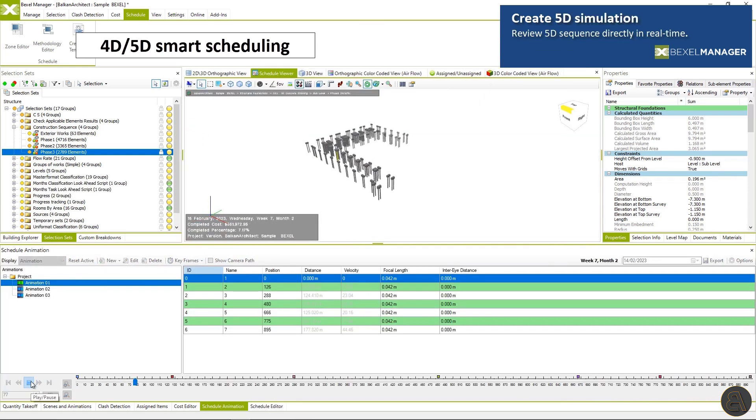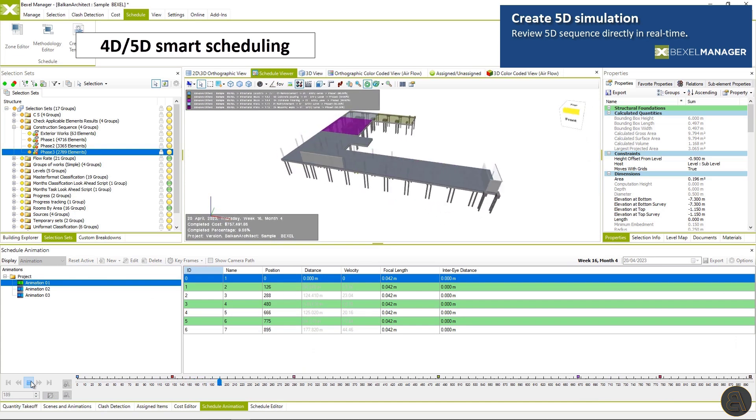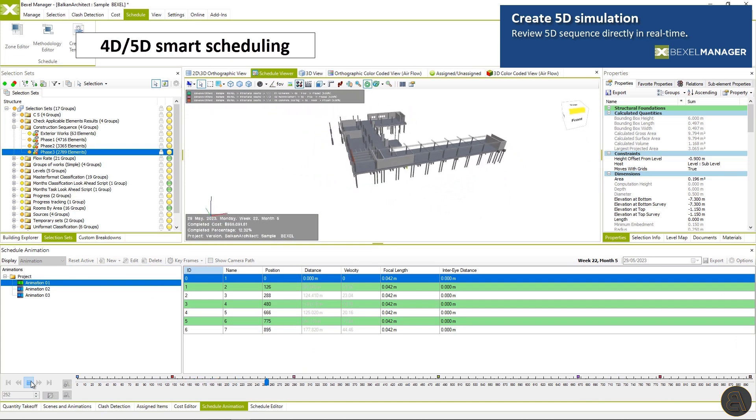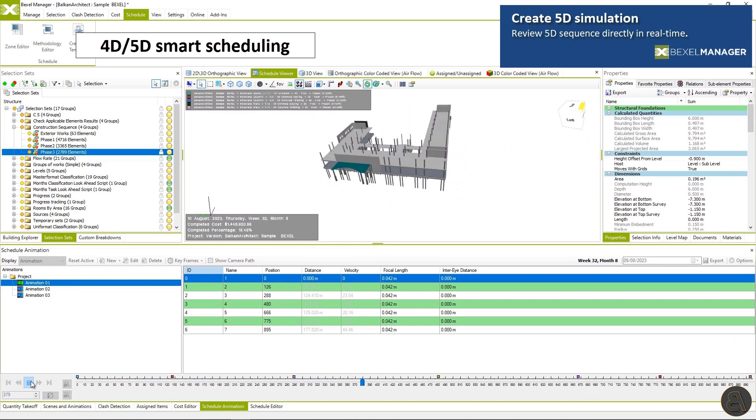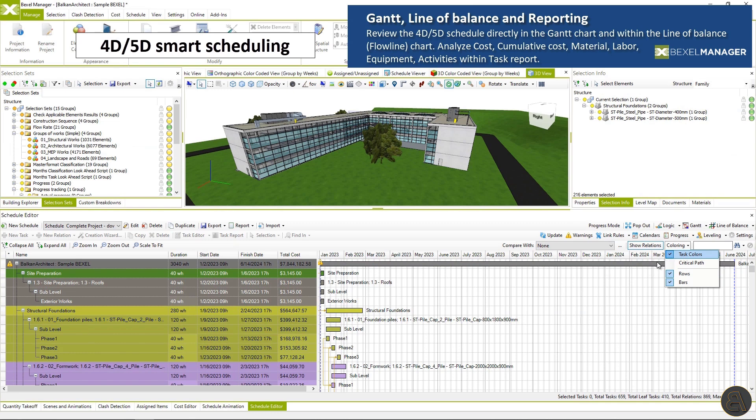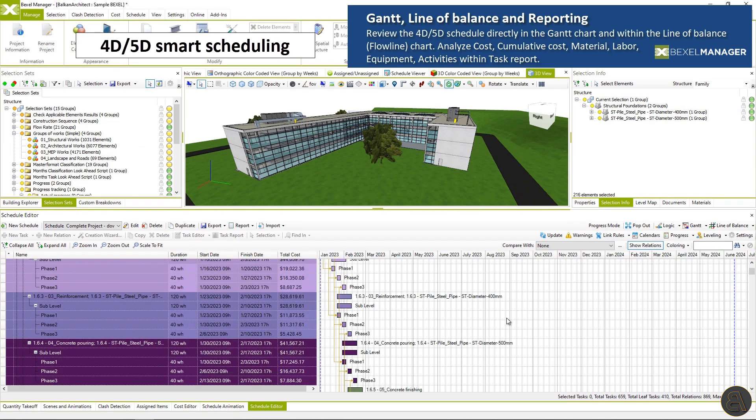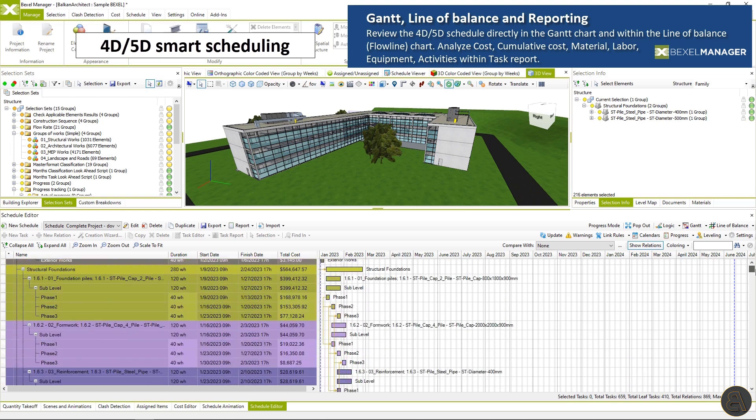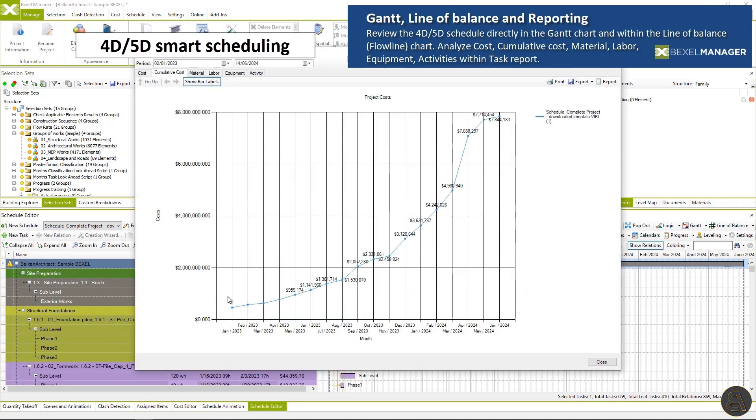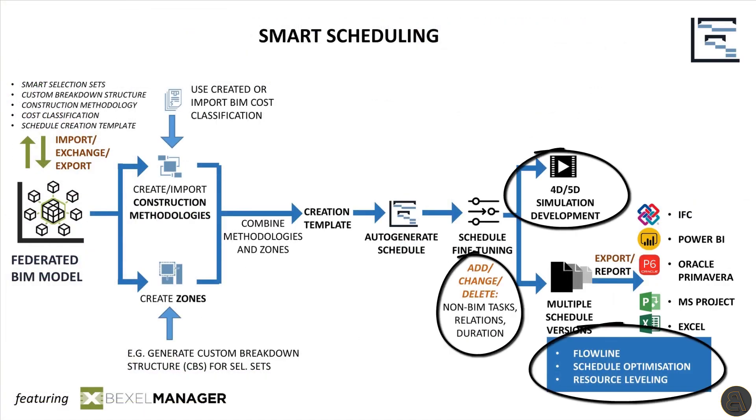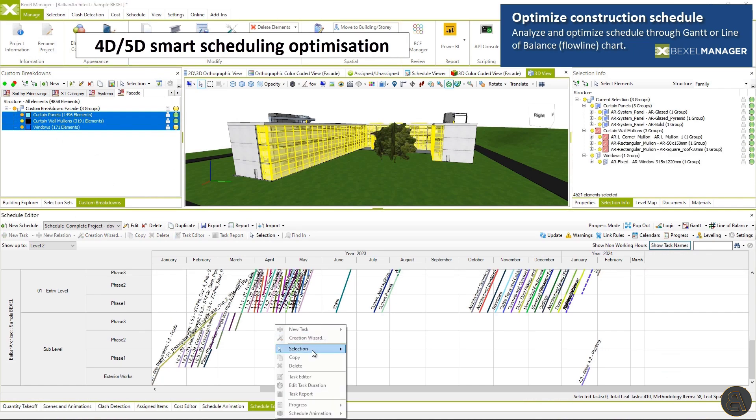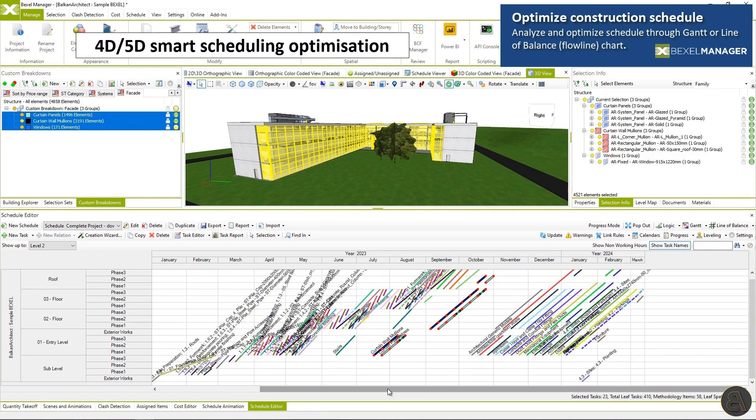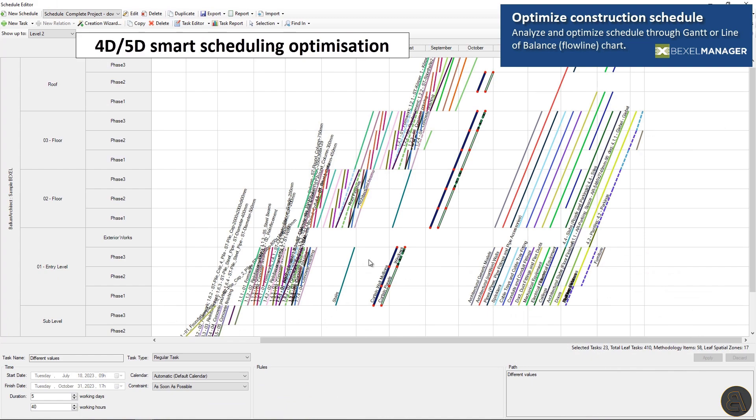A created schedule can be analyzed through 5D simulation. Review the initial schedule directly in the GANTT chart and within the line of balance chart. Analyze cost, cumulative cost, material, labor, equipment, activities within the task report. Fine tune and optimize the initial schedule through the GANTT and line of balance chart.